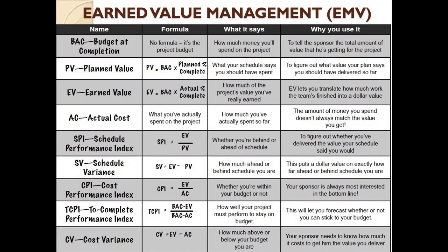Okay. Plan value, what does it mean? It means the value you plan, the amount of work you anticipate to have finished in spending a certain amount of money. So I can make a comment like, in 2 weeks' time, we will deliver a value of our work. It will be worth 2 million naira on this project. What that means is that in 2 weeks' time, I will have spent 2 million out of the budget doing exactly the amount of work 2 million should have done. That is, you gave me 2 million naira. By the time you come and look at the work I've done, you will equate it as 2 million naira. You will say, okay, it is worth 2 million naira.